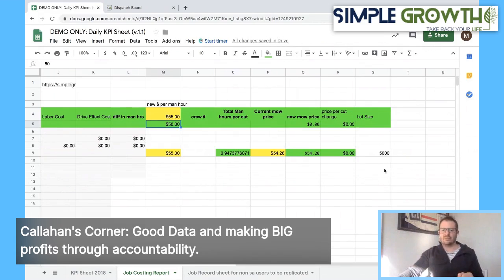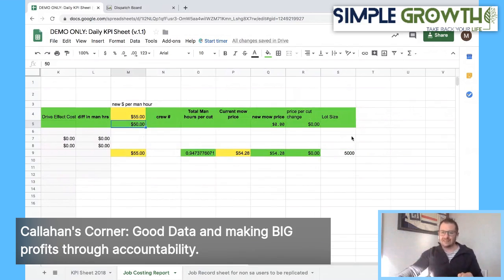And then the final part here, before I finish up or answer any live questions, is the lot size. If you're using something like Service Autopilot or even an Excel sheet, we should be tracking the lot size, the turf square footage or the gross square footage. And now we're going to have times to mow, blow, and edge or stick edge, depending on your part of the country, of how long it takes your guys and girls with your equipment and your production to go in and manage a property of 5,000, 10,000, whatever that is. We have now enough data to average out and figure out what it takes you to produce lawn mowing at those different increments of size with your team and your crew.